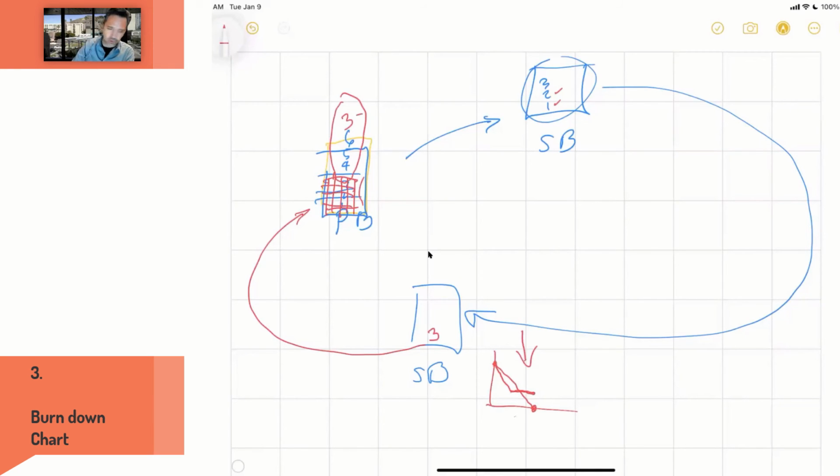So a new estimation here. Moreover, a new priority. If I didn't finish with the 3, it's maybe because number 1 has a high priority, number 2 has a high priority, and number 3 has a low priority. So it's the last thing to do, and I didn't finish, low priority. So far, it is better to not finish 3 than to not finish 1.